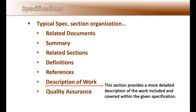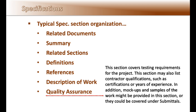The description of work section provides a more detailed description of the work included and covered within the given specification. The quality assurance section covers testing requirements for the project. This section may also list contractor qualifications, such as certifications or years of experience. In addition, application mock-ups and samples of the work might be provided in this section, or covered under submittals.